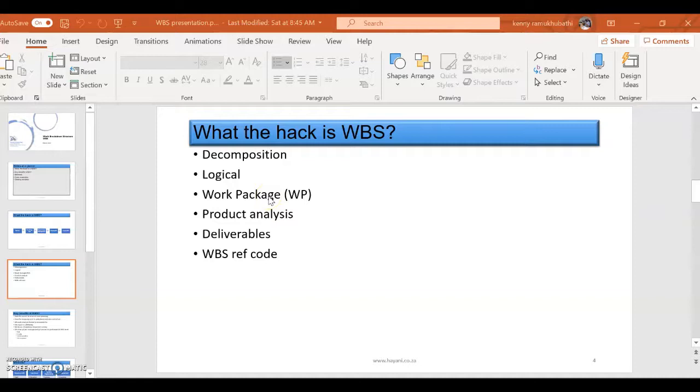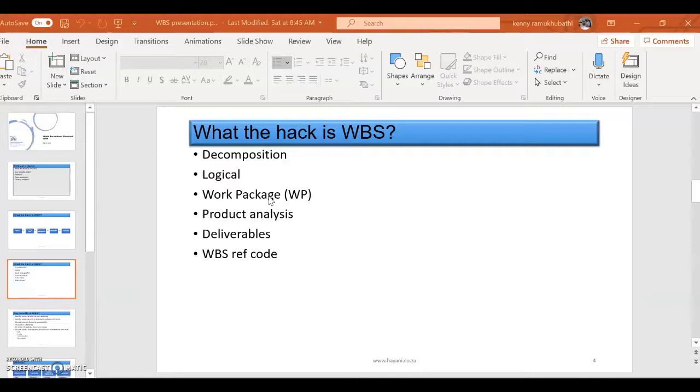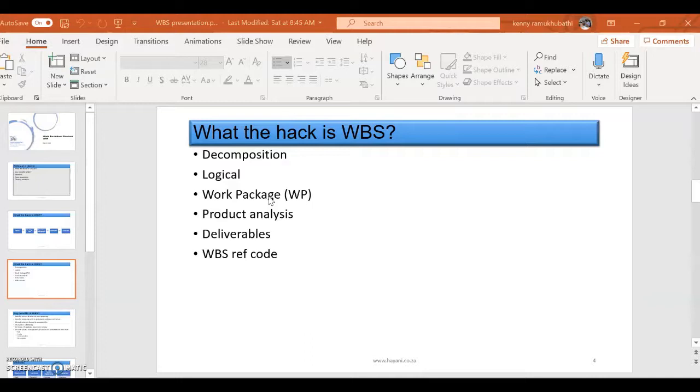Work package is a term that you're going to be used to when you start doing the WBS, because it's the lowest level of work element - or lowest level that you can break down a work into. If you look at, let's say you've got a deliverable and then you do the decomposition until it's in small components, that's the lowest component that you can break it into - it's the work package.